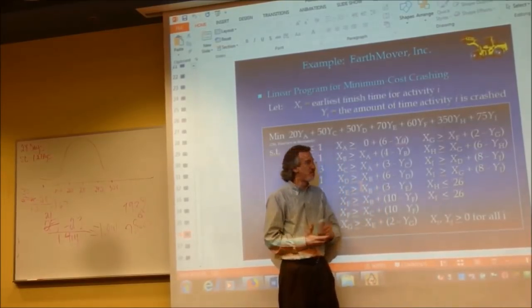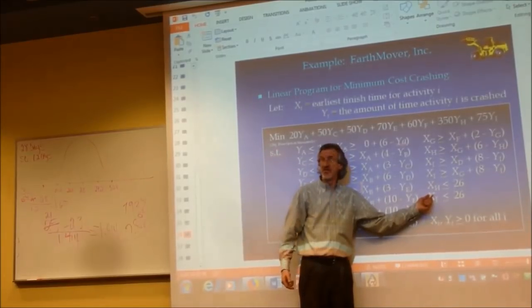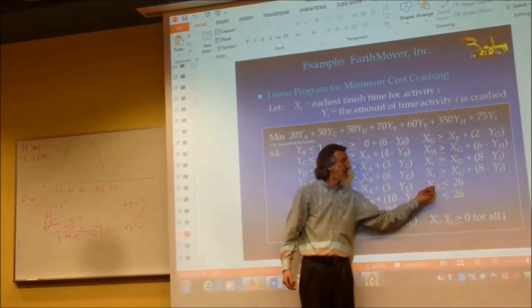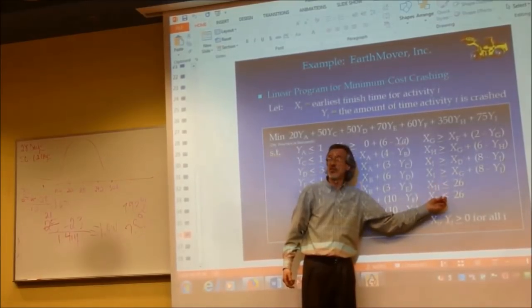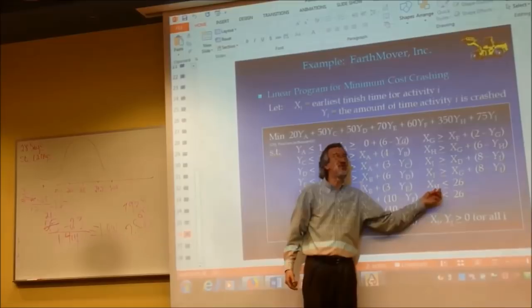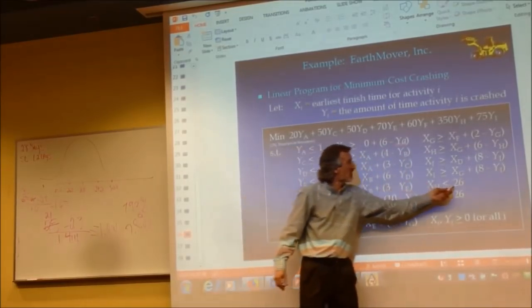Let me say that again. The activities that do not precede any other activities always have their x variables set up to be less than or equal to whatever number of units of time you're trying to crash this project to. So I can see this is being crashed at 26.